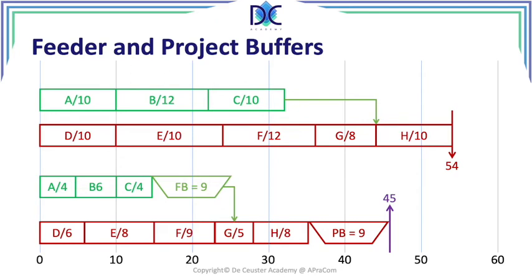So basically what we have here is the new schedule, and now we have to add the critical chain to that. I didn't do it here, but these calculations are already very interesting because they can help you reduce the problems on your project. You can work with the buffers, and the advantage is as long as the critical path or the non-critical path is not moving outside of the 45 periods in this case, we would not have to report any delays to the customer.